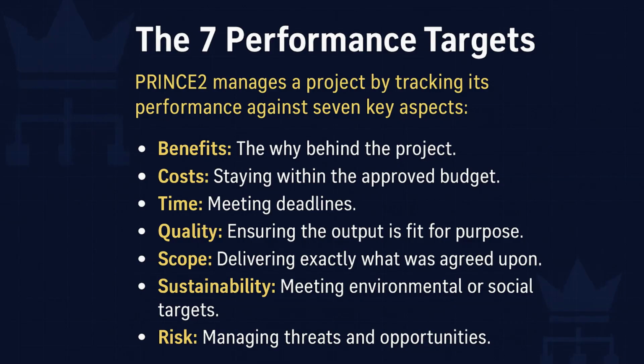And they present all that to the board. Yes. Using the DP process, the board reviews this information, the performance of the last stage, the plan for the next, the updated justification, and decides, do we authorize the next stage? Does the project still make sense? Should we continue? It's that vital go-no-go decision point.